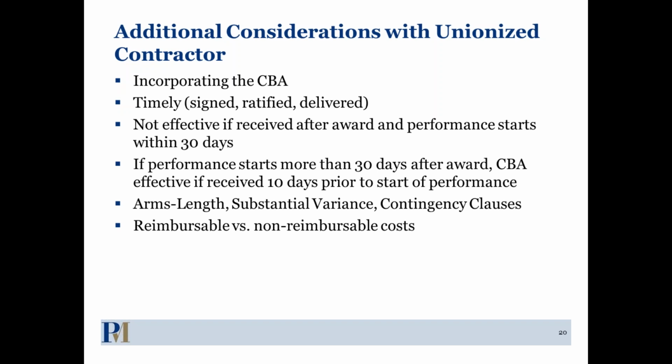Lastly, Nichole sort of touched on this earlier, but remember when you're negotiating these things that there are some things that are not reimbursable. Generally, wages and bona fide fringe benefits are included. That's health and welfare, shift differentials, holiday pay, vacation. That does not include, however, things that are generally seen as benefits to the business, so uniforms or overtime are not going to be included, bonuses aren't included, paid meal breaks. So just because you have increased costs doesn't mean that the government's going to end up covering this ultimately.